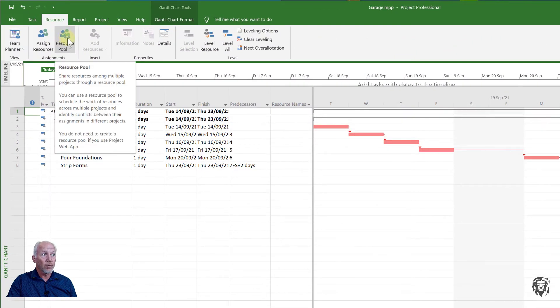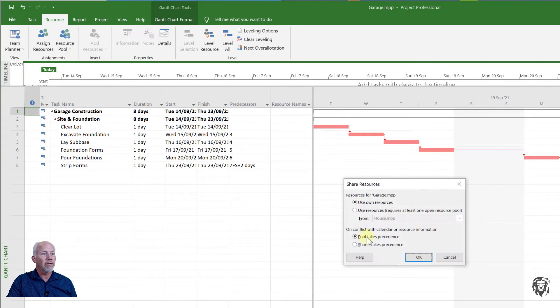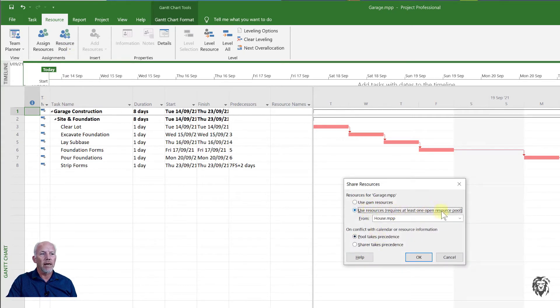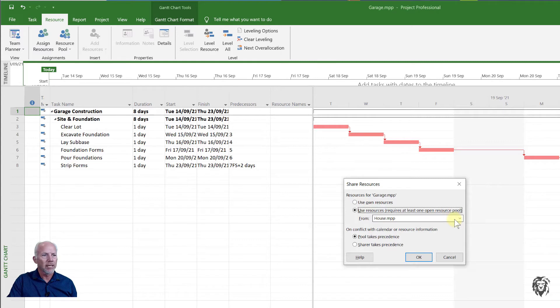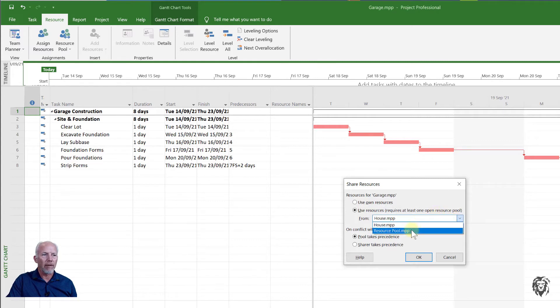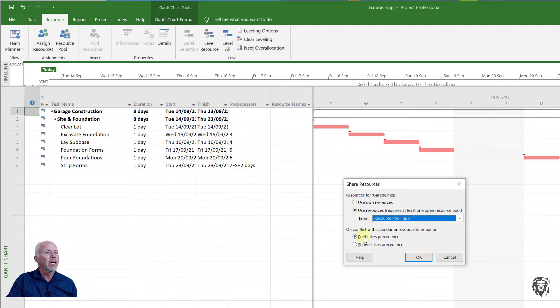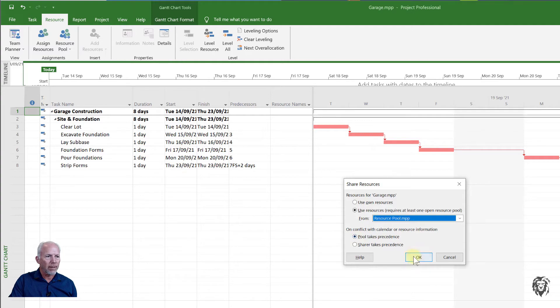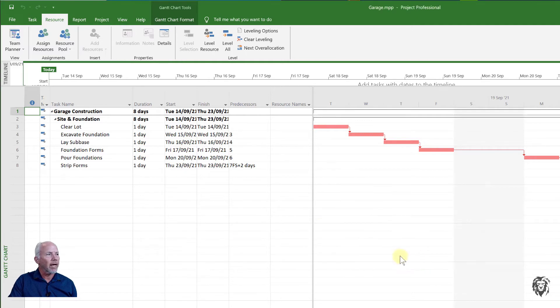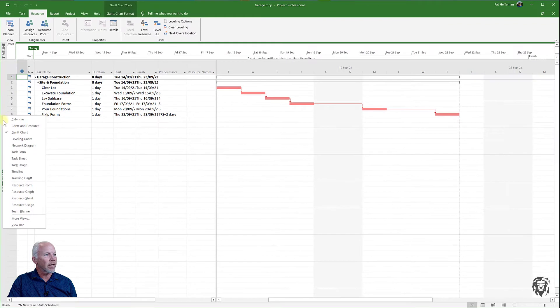I'm going to go to the resource tab and assign a resource pool. So I'm going to the resource pool, choose share resources, use resources from a resource pool. What it does is it offers as a drop-down box any of the open projects. For this to work that resource pool project has to be open and available to you. I'm going to allow the pool to take precedence.